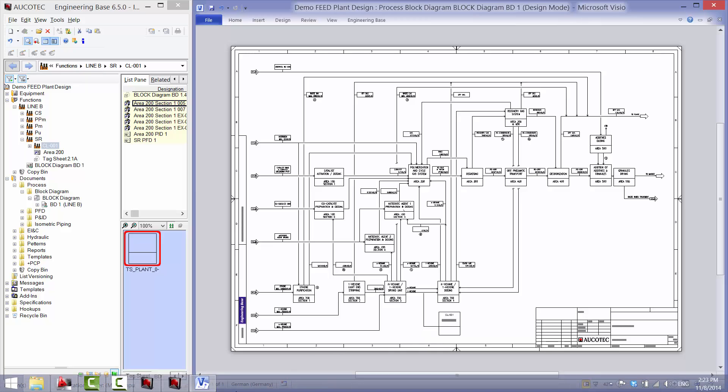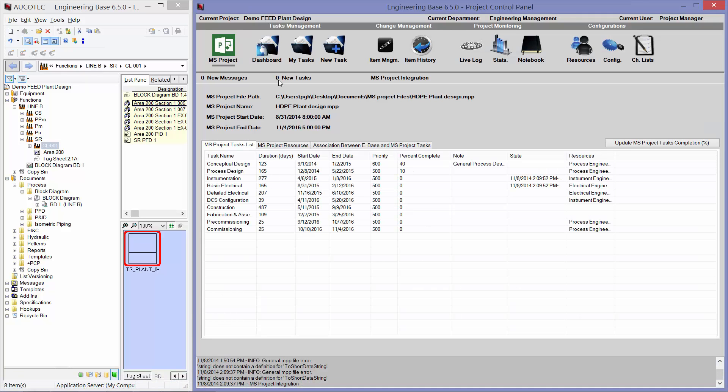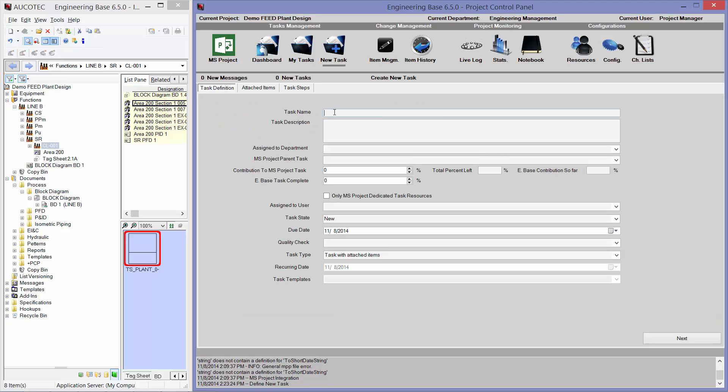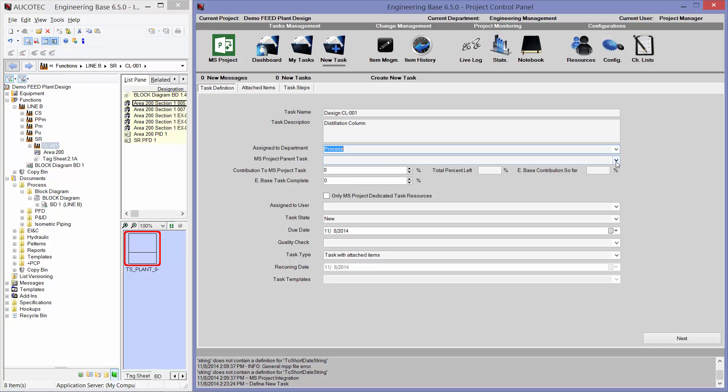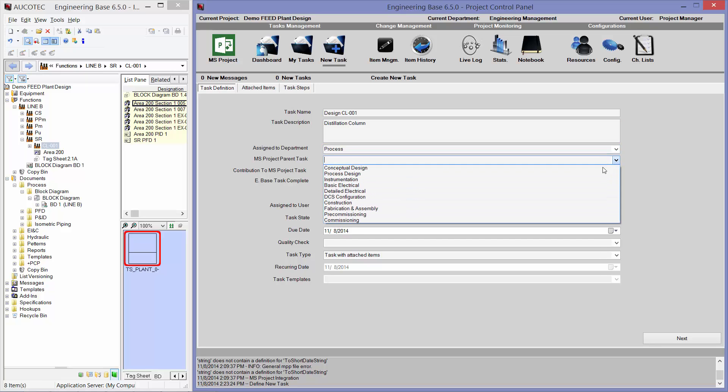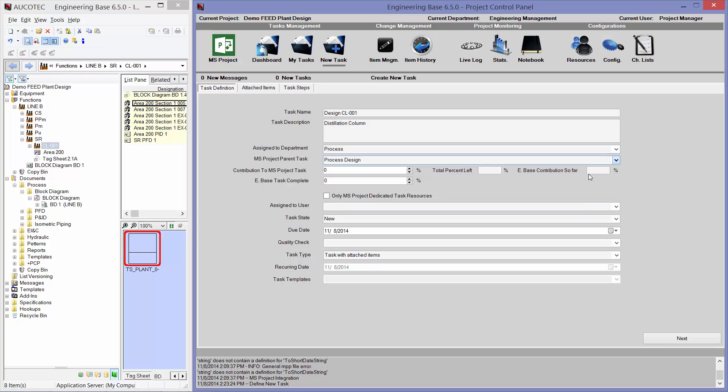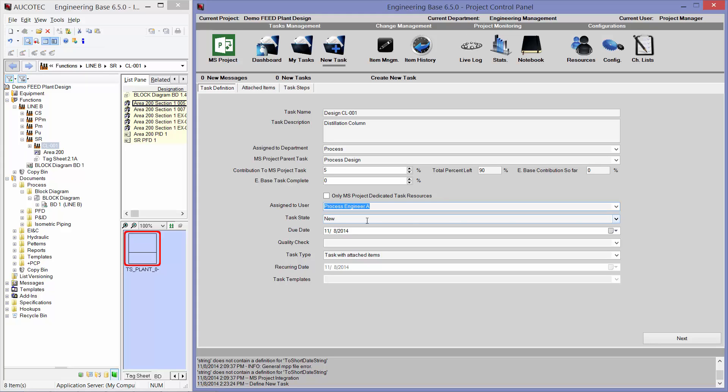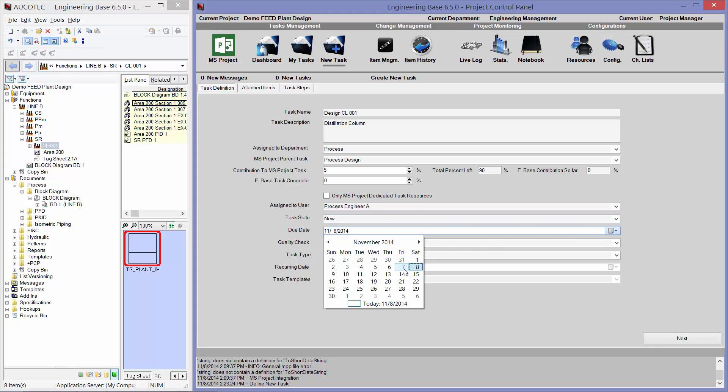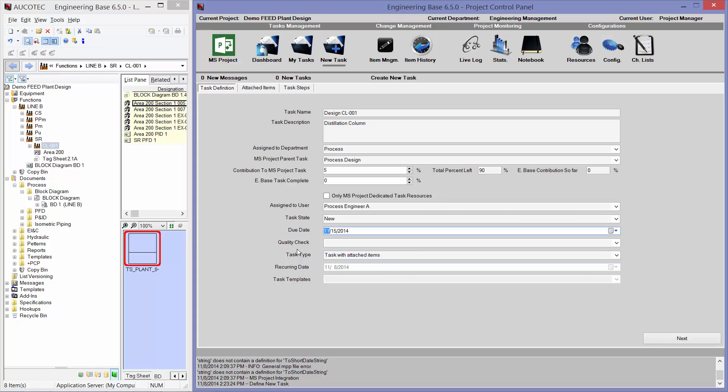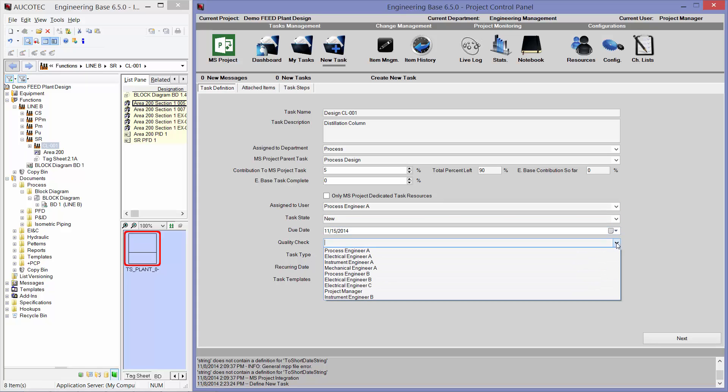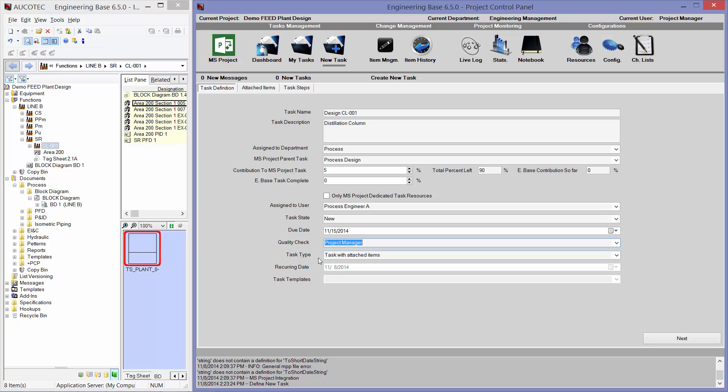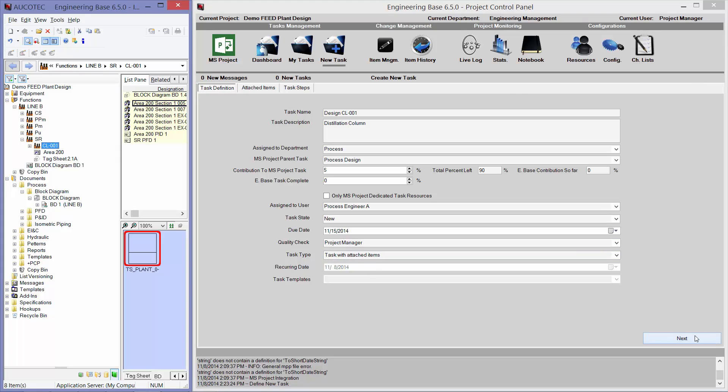And then, I will go to the Project Control panel, and I will create a new task for my process engineer. I will assign it to the department of process. I will attach it to the task of process design from MS Project, and I will say that this task is 5% of the major task. You can see that the total percent left is 90%. I will assign it to the user, Process Engineer A. The state of the task is new. The due date can be end of next week. The quality check person can be Project Manager. And the task type is Task with Attached Items.